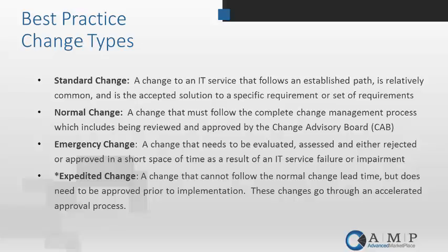Typically speaking, standard changes will start out as a normal change and then be nominated into a standard change. So those could be things from anywhere from a firewall change in some organizations, and again, in some organizations those aren't a standard change, to extending a field in a table, to any type of data-related issues that may be out there.